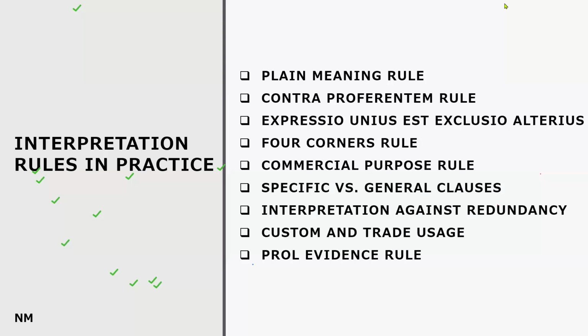But at the same time, if you go to 4.12, that means unforeseeable physical conditions, I'm referring to these clauses through the FIDIC 99 grade. If the project is delayed by unforeseeable physical conditions, the contractor is entitled only to time and cost, no profit given, and it is silent.